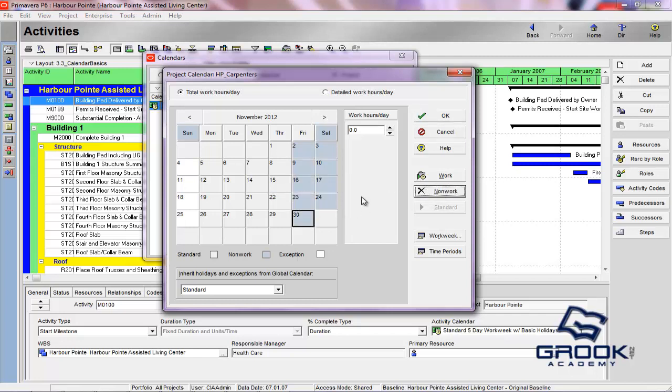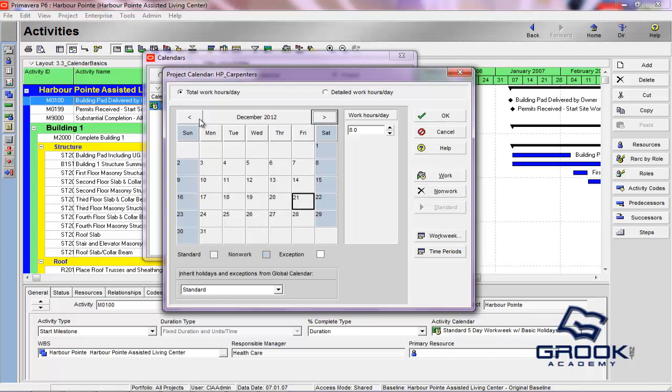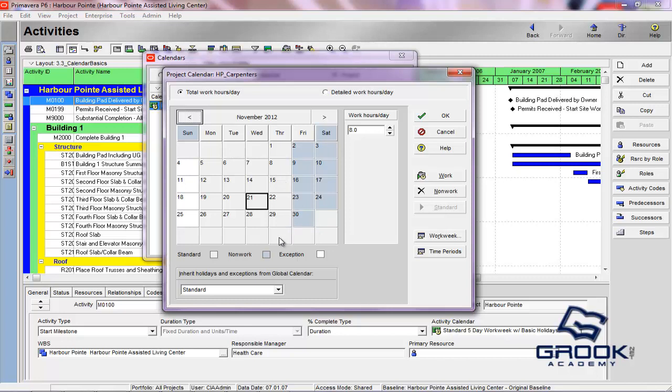And what we'd like to do is turn off the Fridays as non-work. But keep in mind that this is only for the month of November. So if we were to bounce ahead to December, you'll see that it's not carrying over to other months. So these calendars, you really have to be mindful of their length or their scope. So what we've done is successfully set up this HP Carpenters as a group that works from Sunday until Thursday. So their five days are probably offset from everyone else.